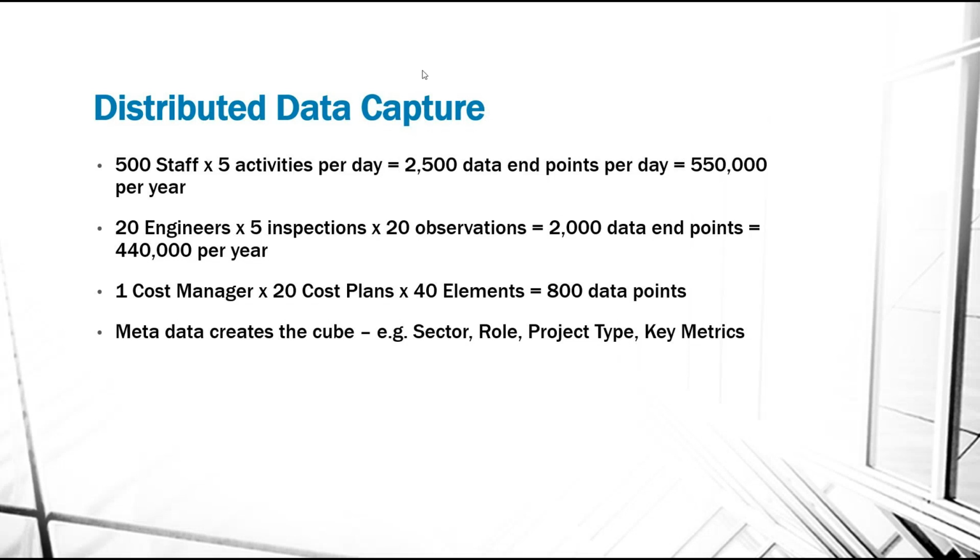That data gets matrixed, if that's the term. It gets created into a cube basically by the metadata that's associated to it. Whenever someone puts in a timesheet entry, they might only put in one data entry, 1 hour against one activity, but that activity has a project, that project has a sector, and they're in a role on that project. There are key metrics associated to that project, for example the gross floor area of the building, the number of floors, the car parking spaces. All this other data is already there, and so you can start to get analytics and intelligence around what's going on.